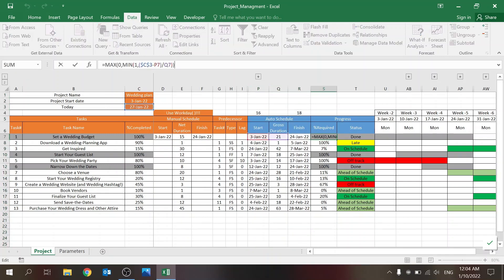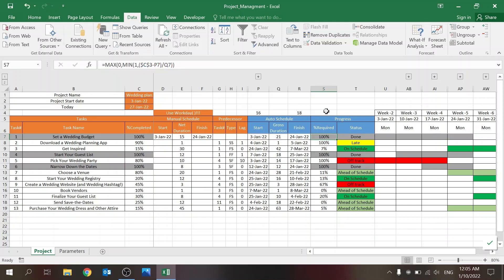The Required column looks at what day you are on — whether it's today or whatever date you've pulled in — minus when the task needs to start. A MIN and MAX function ensures this value stays between zero and one, because in some cases the calculation would go above one, which wouldn't make sense.